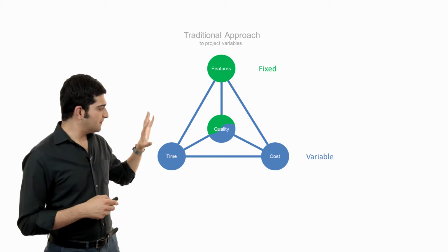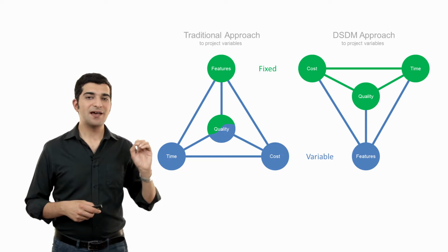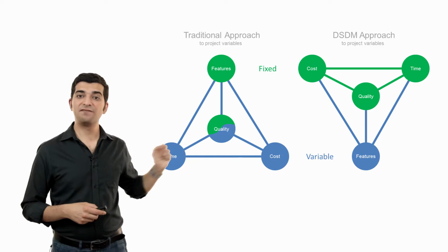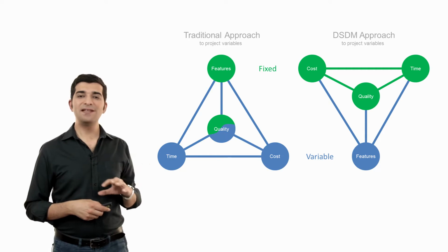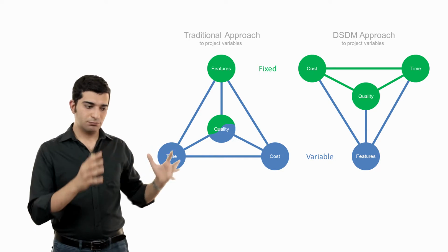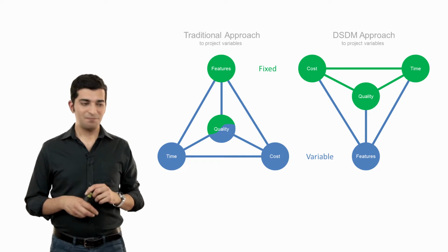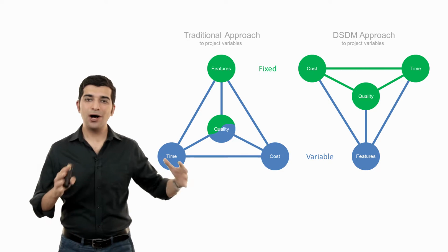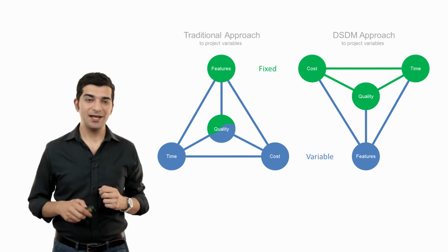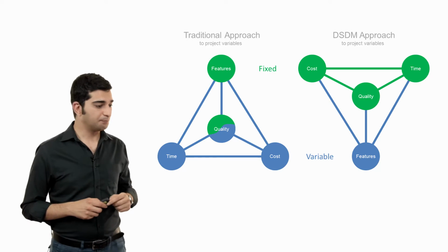So instead of using this system, DSDM uses that. And in that system, we use a fixed duration with a fixed cost, and we can afford to fix the quality. And so the only thing that is dynamic, the only flexible thing in our system of constraints is the scope. We set the duration and the cost, and we go on through the project, and we will deliver as many features as we can. It's a little crazy, I know, but that's good. That really prevents that problem.